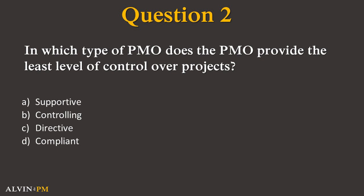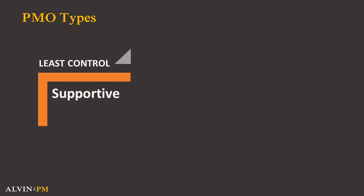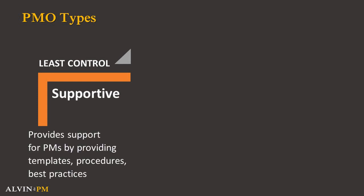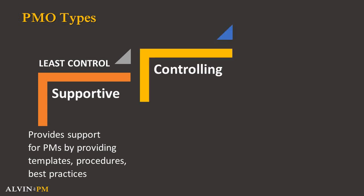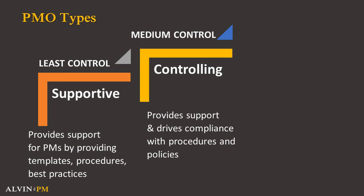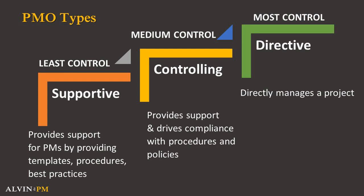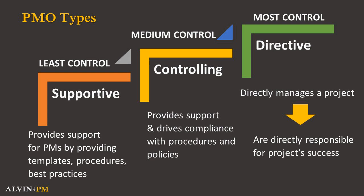Question 2. In which type of PMO does the PMO provide the least level of control over projects? A. Supportive, B. Controlling, C. Directive, or D. Compliant? The correct answer is A. A supportive PMO serves as a foundation and provides support for project managers by providing templates, procedures, standardized processes, and best practices for managing projects. In this sense, a supportive PMO acts primarily as a helping consultant and therefore has very low control over projects. A controlling PMO has an additional layer on top of a supportive PMO by providing support as well as driving compliance with the organization's procedures and policies. A directive PMO has the most amount of control and authority over a project since they directly manage a project, are responsible for the project's success and failure, and assign project managers to the different projects in the organization.